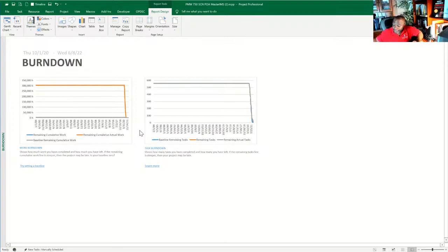Not the entire schedule. You've got to be able to filter what is most appropriate, because you're going to lose people's attention just by showing a huge amount of work in a schedule. But using the reports, narrowing it down to why they're in that meeting, you always have to ask those specific questions. What's done is done, and if you're not done, what are you going to do to get back on track, and how much are you overburning with the cost and the resources and so forth. So you're able to manipulate reports to your advantage.